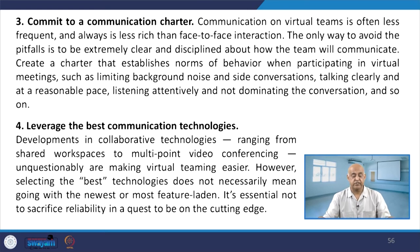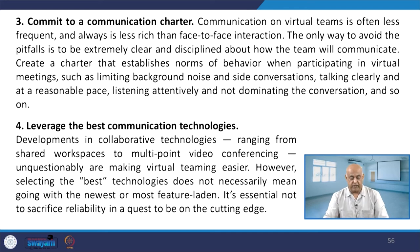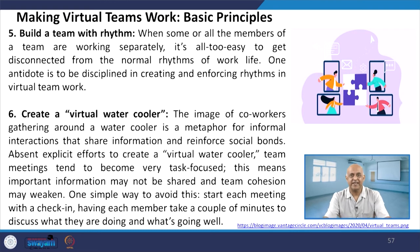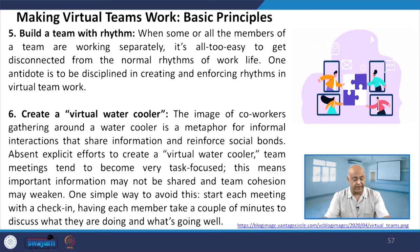Commit to a communication charter to address communication challenges. Leverage the best communication technology — the best technology does not necessarily mean the newest or latest, but the appropriate technology. Build a team with rhythm — those who are interacting must be in proper rhythm and understanding of each other, so they can easily connect. Create a virtual water cooler — a metaphor for informal interactions that share information and reinforce social bonds. Without it, team meetings tend to become very task-focused, and important information may not be shared while team cohesion may weaken. One simple way is to start each meeting with a check-in where each member takes a couple of minutes to discuss what they are doing and what is going well.